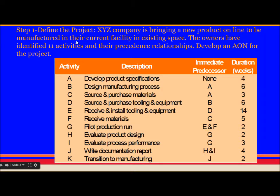As I use this example in my CPM video, I will use the same example here. XYZ company is bringing a new product online to be manufactured in their current facility in existing space. The owners have identified 11 activities and their precedence relationship. Develop an activity on node for the project.